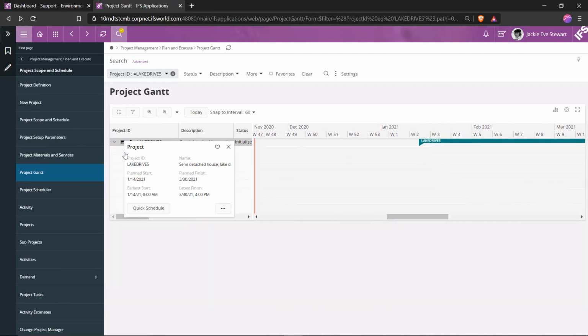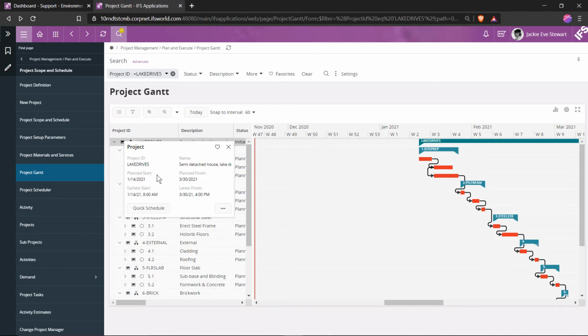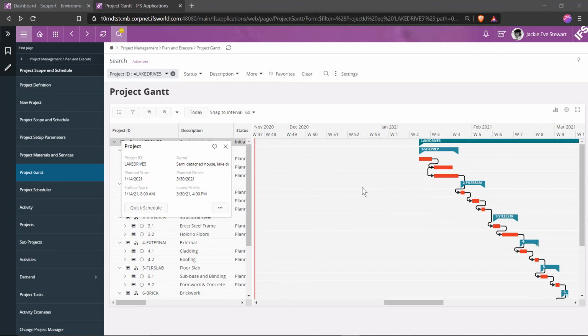If you look into project details, you can now see the scheduler has adjusted the finish date to the last working date and time, since I used the earliest hour of 31st as the end time, which is a non-working time. Most importantly, it has calculated 14th January as the start date if you want to finish it before 31st. This is how IFS projects functionality helps the planners to calculate an unknown start date from a known finish date.